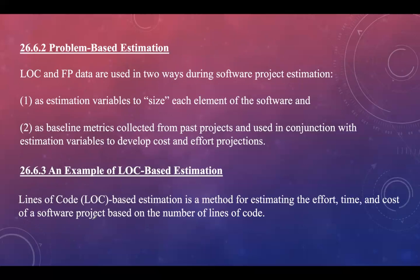Problem-based estimation is a technique used in software development to estimate effort, time, and resources based on specific problems or requirements that need to be addressed. This approach is particularly useful in environments with high uncertainty or when dealing with complex features. Lines of code and function point data are used in two ways during project estimation: they can be used as an estimate variable to determine the size of the software, and as baseline metrics collected from past projects used in conjunction with estimation variables to develop cost and effort projections.